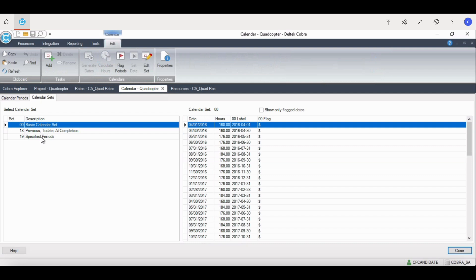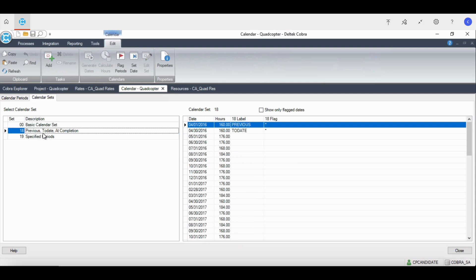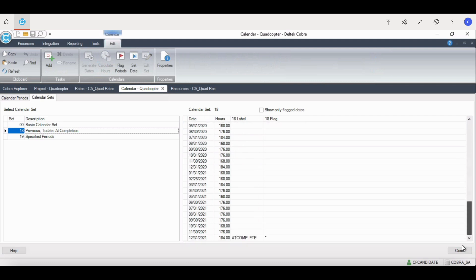Calendar set 18 defines the periods used to generate IPMR formats 1, 2, and 5. This set flags the previous period, the to date, and at the bottom are at complete.